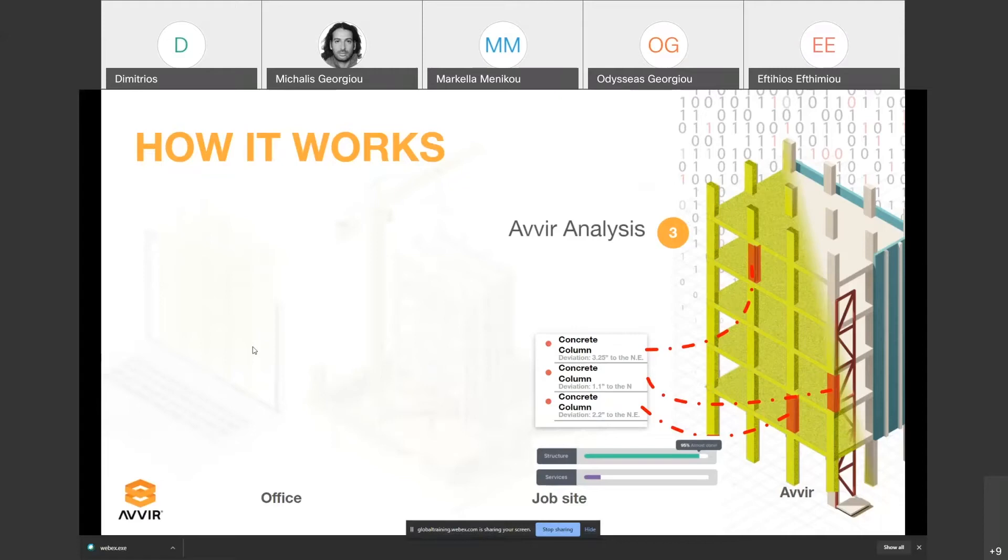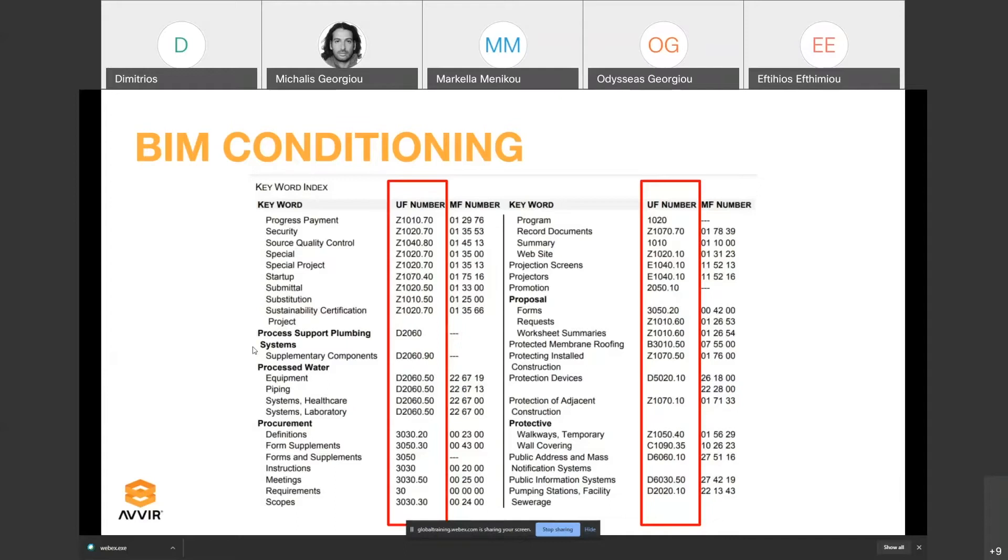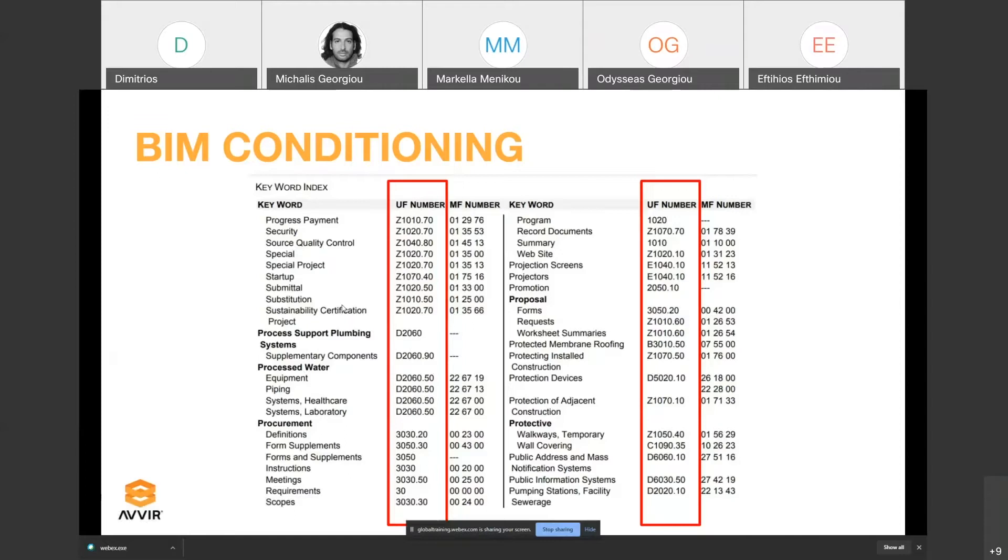To do that, in order for the platform to understand what is what in the BIM model, we enrich it with uniform coding, which is a global standard for categorizing the different elements in construction. You can see codes like D2060 or Z1070, which we inject into the metadata of the BIM model to separate which trades are which and facilitate reporting.